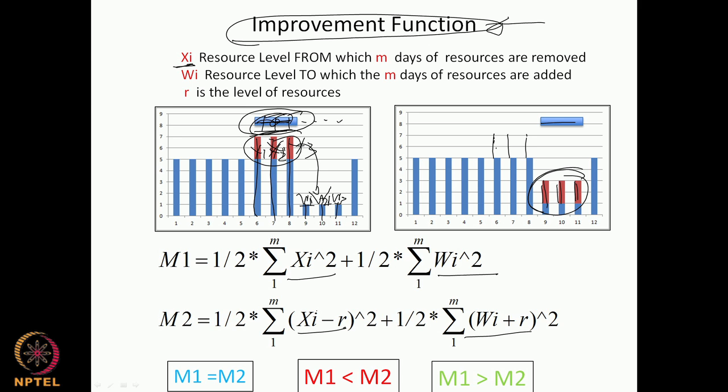Or we could have that before the shift the moment was more than after the shift. Which of these would you want to happen if you were going to do the shift? If my moment before the shift was greater and after the shift it is less, this is the sign I am looking for in order to make the shift to the activity.